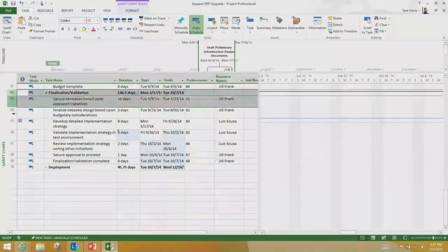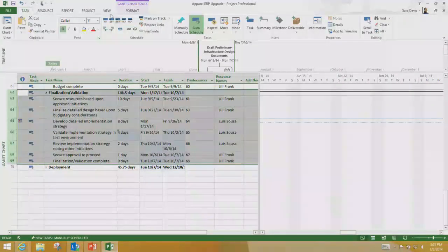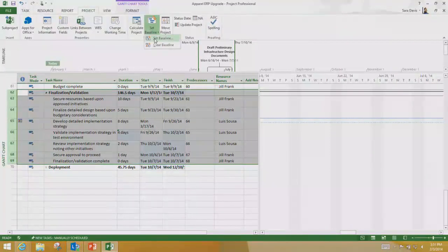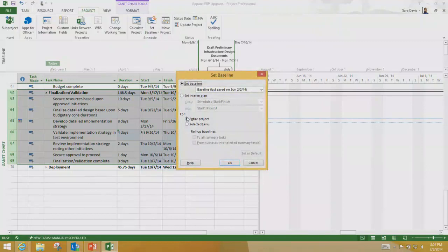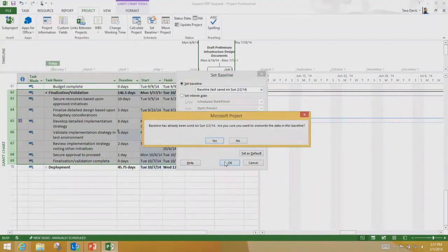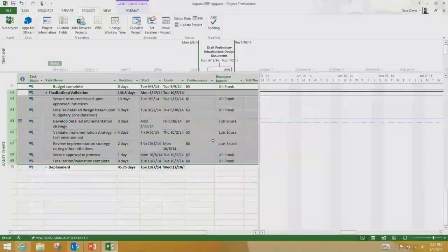So I can just select these tasks. Just set baseline. Set baseline 1, but I just want my selected tasks, and I can also choose how to do my roll-ups here. So I have this level of granularity within the project client. In PWA, I can set just the big baseline. In project client, I have to come in again to set those little dials.